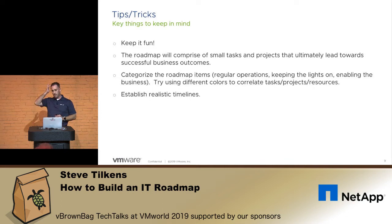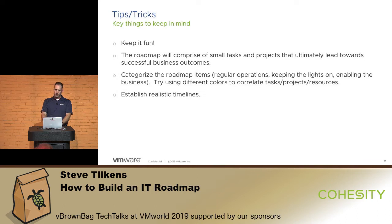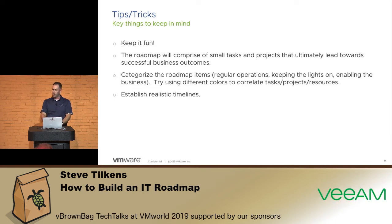Establish realistic timelines. You're going to have delays, hiccups, and things that go wrong, and your roadmap is going to change. Make sure you're building enough time to accomplish each task. Take a vSphere upgrade: if you've got four vCenters and 100 hosts, maybe you could technically do that over a weekend if everything goes perfectly — but you probably wouldn't. You'd want to schedule it over a couple of weeks, work with the business, handle different clusters, and avoid impacting applications. There are always unforeseen delays.